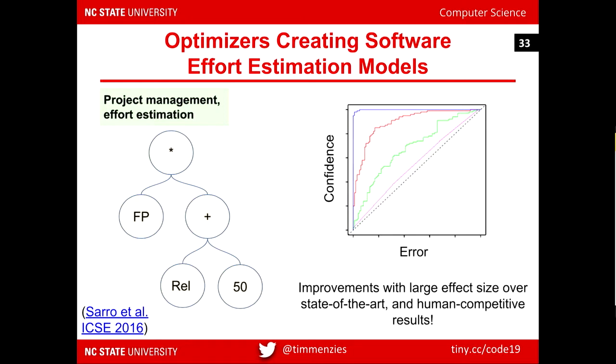Federica Saro at ICSE 2016 talked about multi-objective project management methods, wanting to decrease the error of predictions and the variance of those predictions. She implemented that with a standard optimizer, NSGA2 — the linear regression of optimization. And she found she could do very well in predicting — when she compared against human levels of performance doing effort estimation, she got superior-to-human performance by combining an optimizer with a data miner.